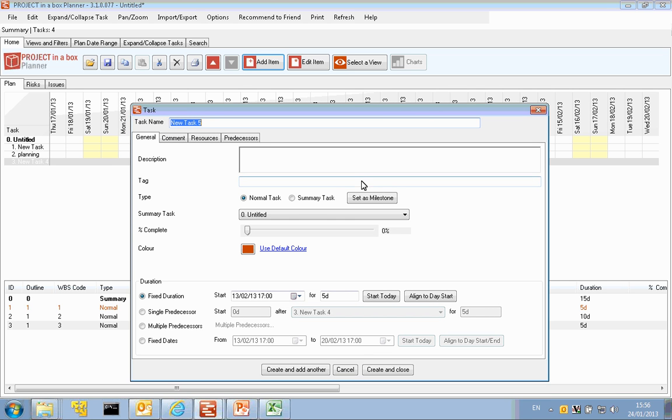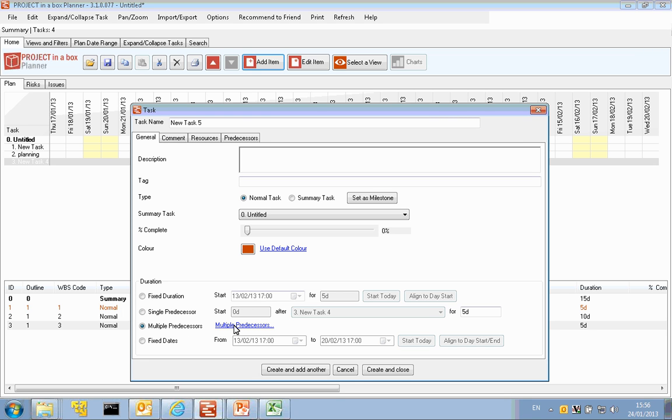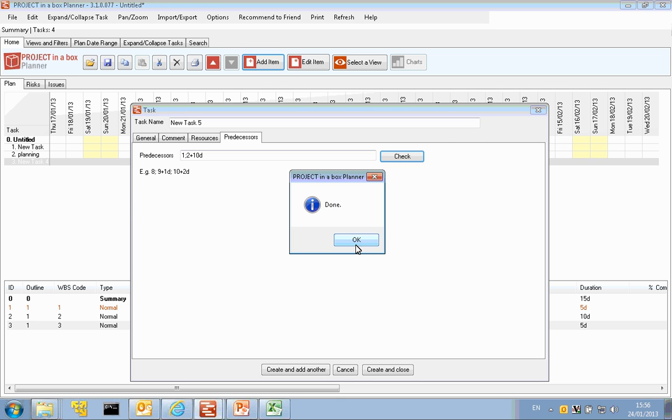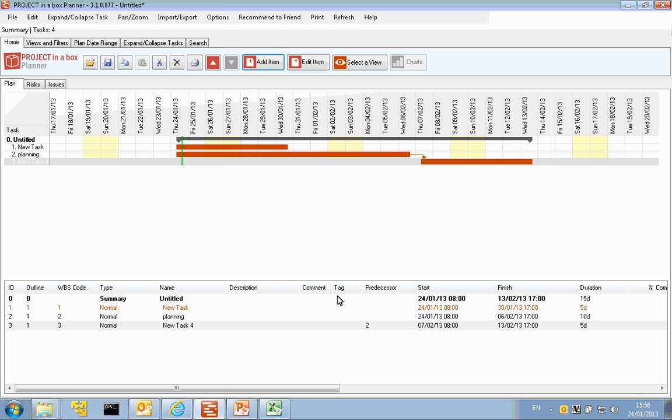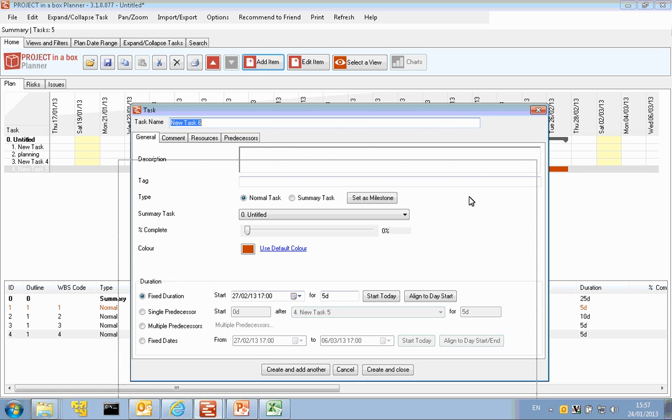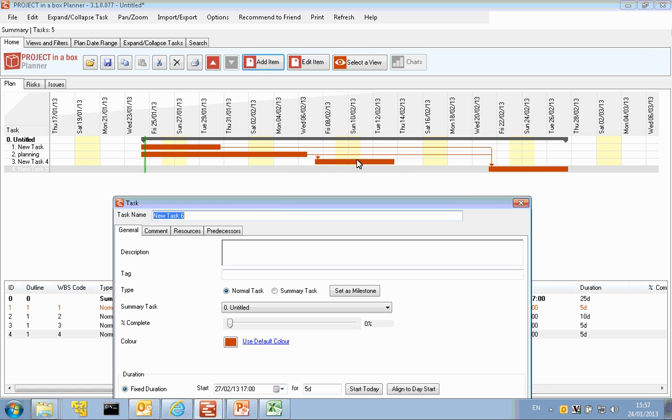So let's have a look at the next type of predecessor. What I could do is have a look at a multiple predecessors arrangement. So here, rather than just finishing after one particular task is finished, I can look for it to start after a combination of things. So here I'm going to look for multiple predecessors. I need to type in the names of the tasks. I can still see them here though. So I'm going to start after task 1 and then also after task 2, but we're going to put a lag on task 2 of 10 days. I can check that to make sure that what I've typed in here is of a sensible format. And now I can create and add another. So we can see again that that's followed the instructions we asked it to. We've got starting after both of them. It's put a lag in because this one here needs a longer period before the next one starts.